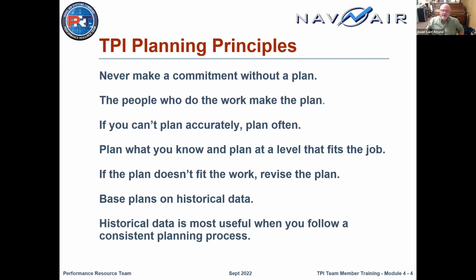So when we teach the TPI to the folks here and coach their teams, we heavily emphasize the first point: never make a commitment without a plan. The answer is, you want this work done? You'll give us 2 weeks, we'll come back and we'll give you an estimate as to how long it's going to take to get it done and how much it's going to cost. If you want to make changes to this plan, this is pretty significant, we're going to need you to give us a couple of days to go back and replan so we can tell you what the effect will be.